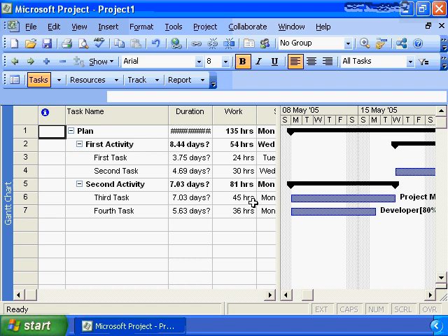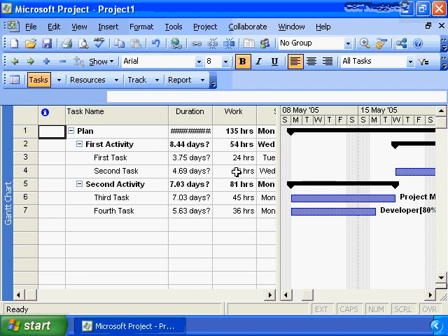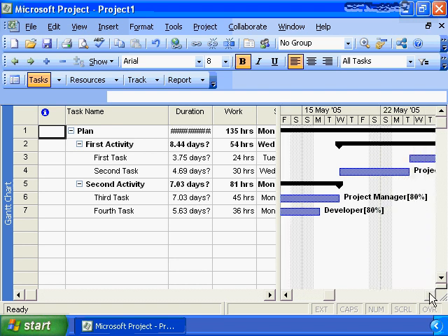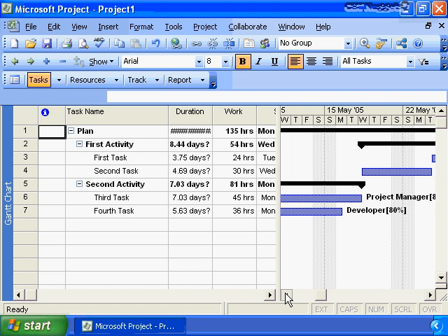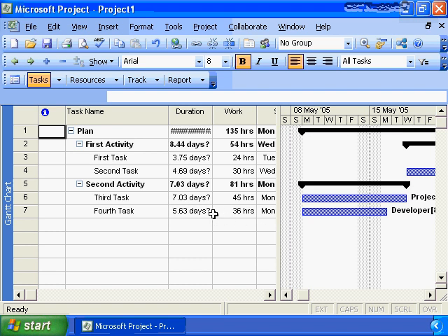It has 45 hours of estimate on it, so therefore I'm going to schedule that first, get it out of the way, so we can go on and do other project tasks. And then I'm going to look for your next hardest piece of work, which is this one at 30 hours, and then finally the remaining task at 24 hours. So that's why it did this rather unique approach to scheduling. And it did the same for our developer, where the developer only had the single task, so it simply allowed the developer to start working on that first task right away on our project.